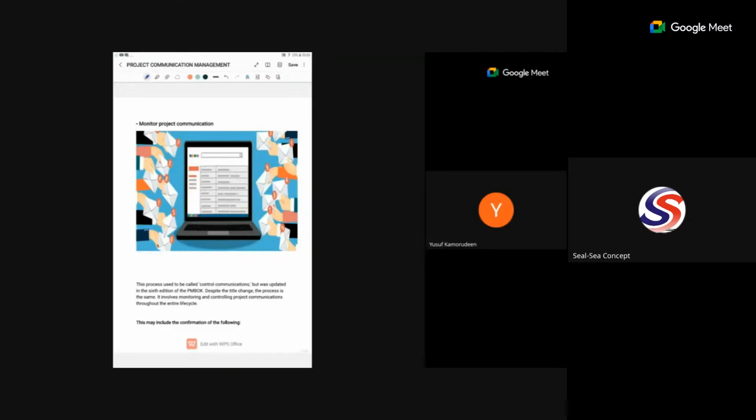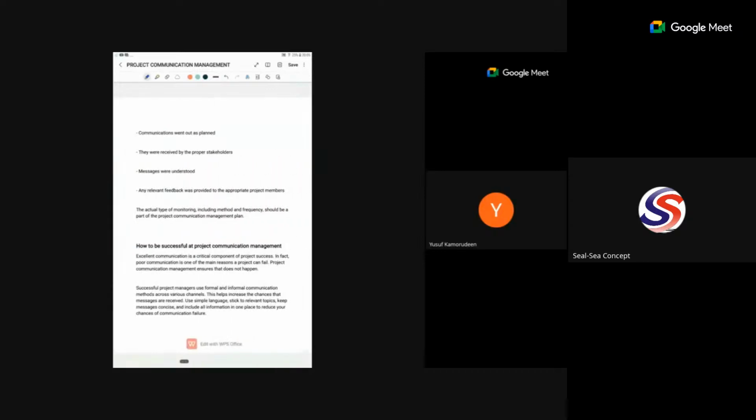Are they really effective? You have decided that your report will be weekly. The weekly reports you have been giving, are they really effective? That is when you review, you monitor it. You really must be sure that, yes, they are giving me the results that I expect, or the results that are planned. This is where you have to monitor if your communication went as planned. This is where you have to check if they were received by the proper stakeholders. Do you have the right people getting the information, or have you been sending this information to wrong people?